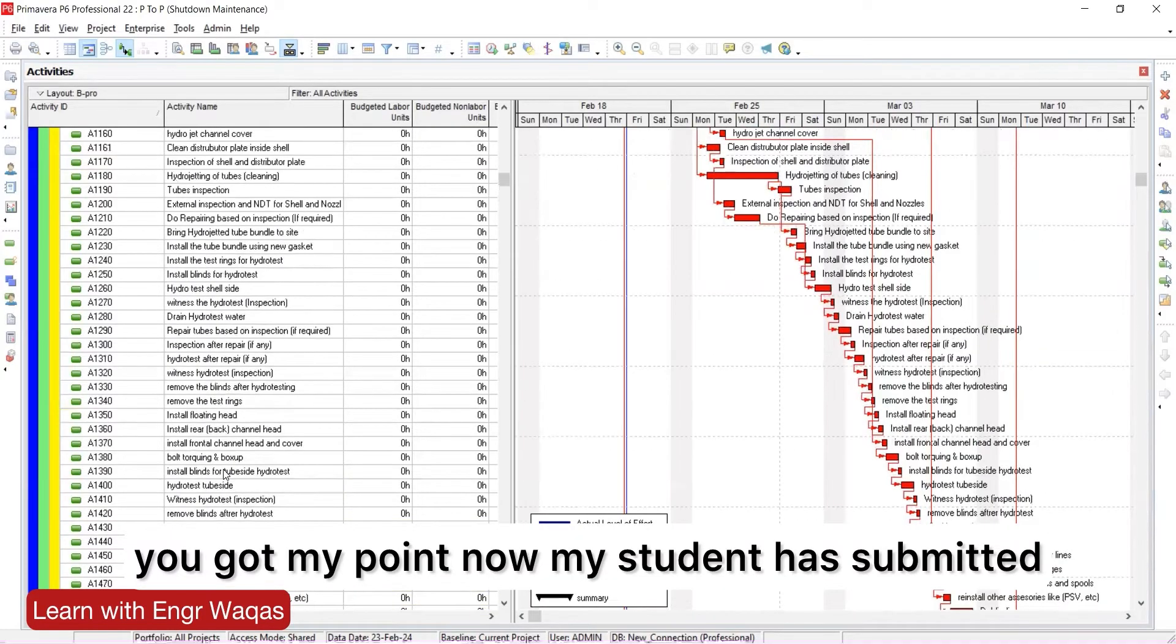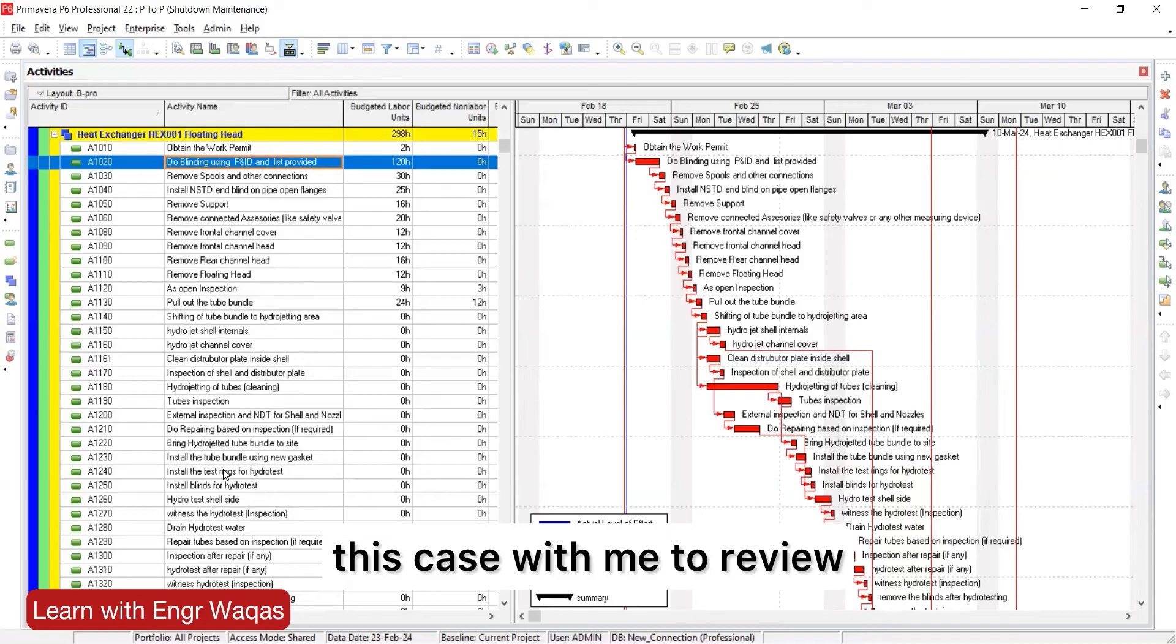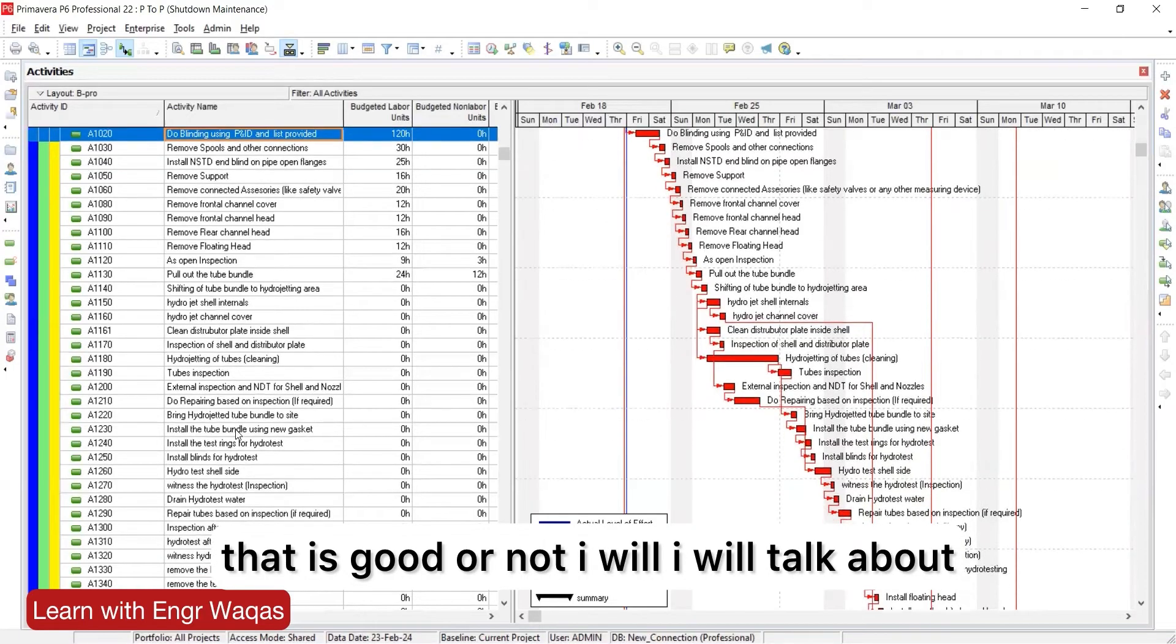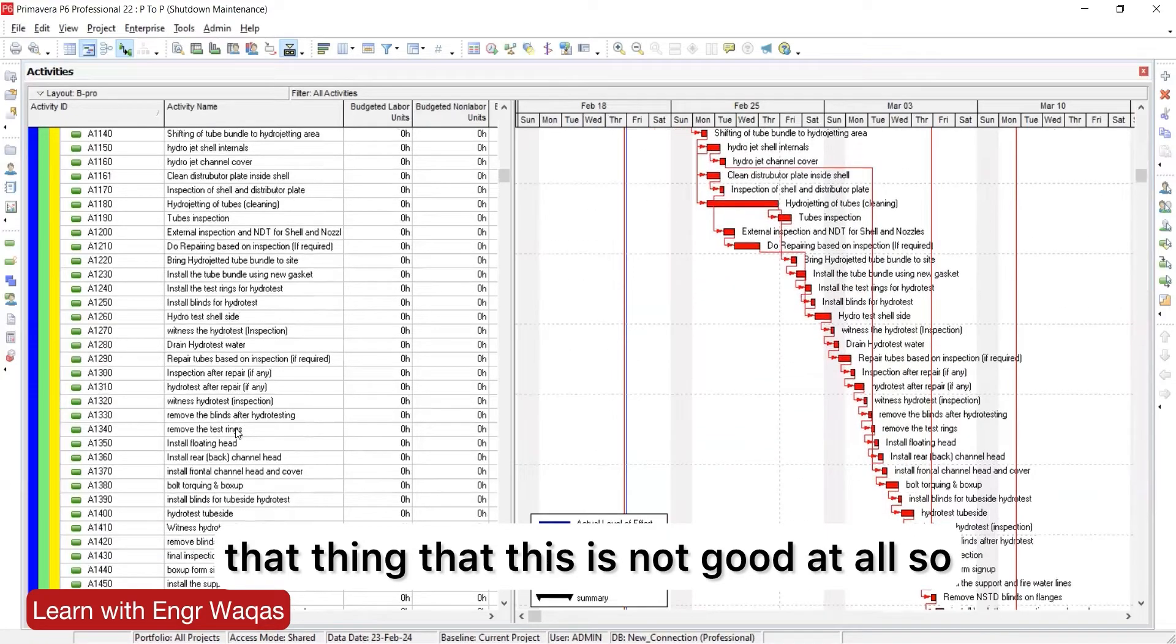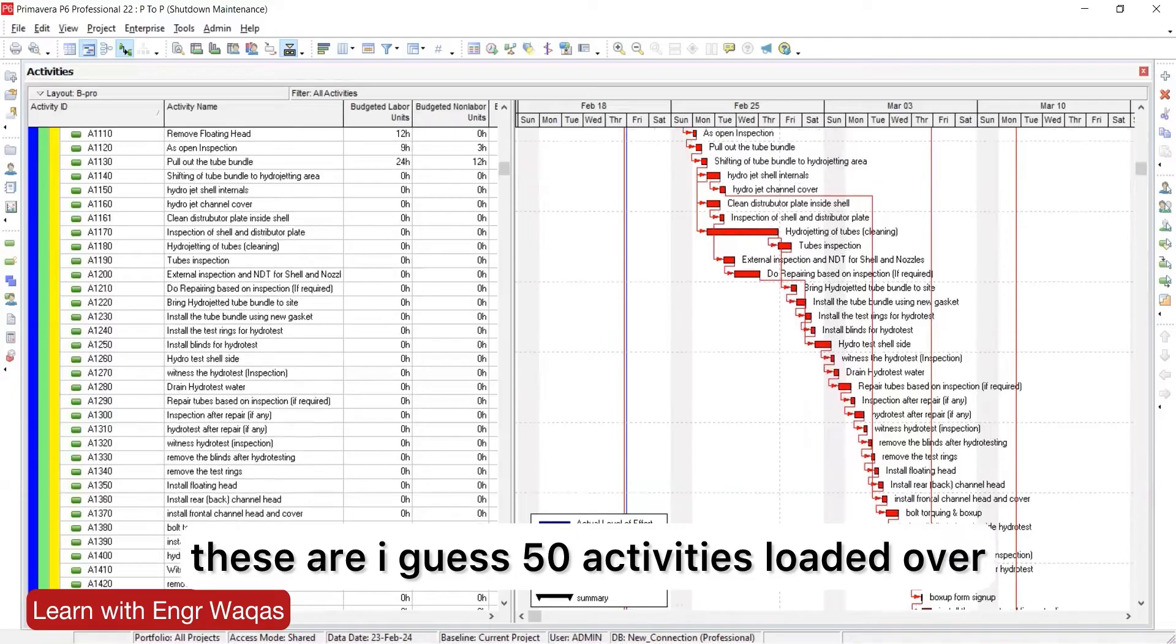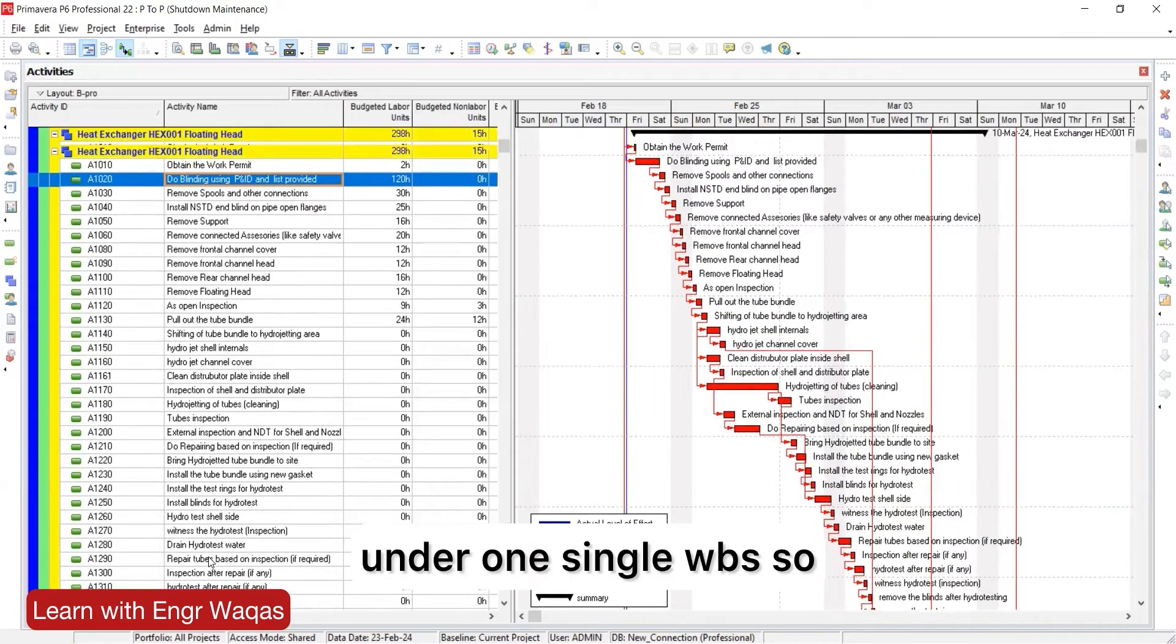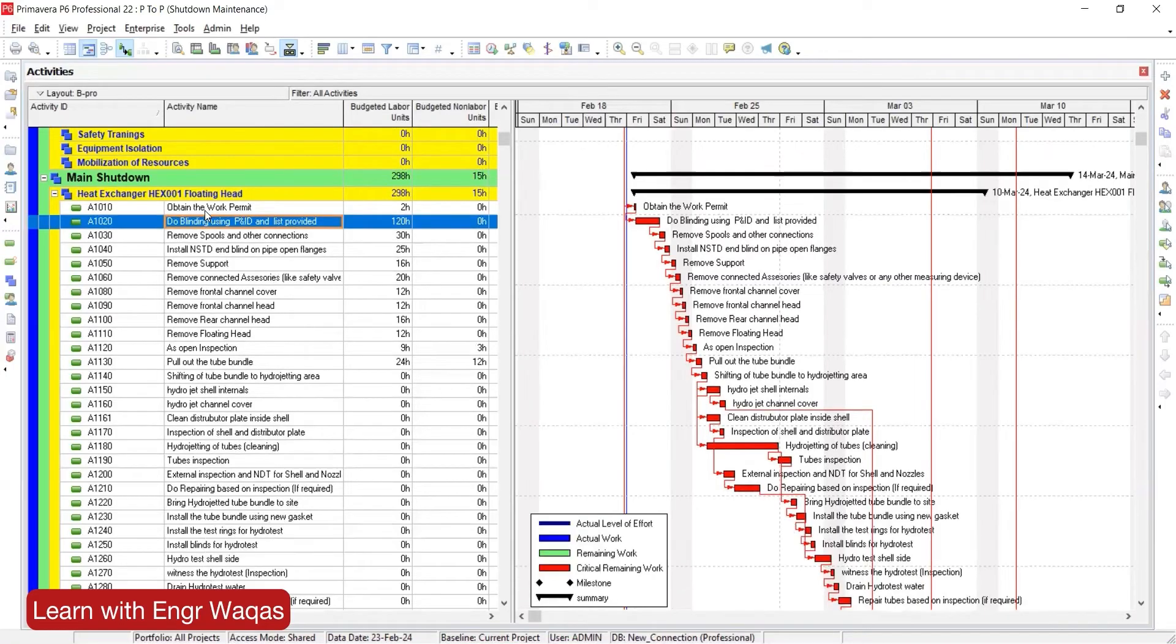You got my point. Now my student has submitted this case with me to review. I will talk about the fact that this is not good at all. These are I guess 50 activities loaded over here. So 50 activities should not be under one single WBS. What I have done to guide my student.